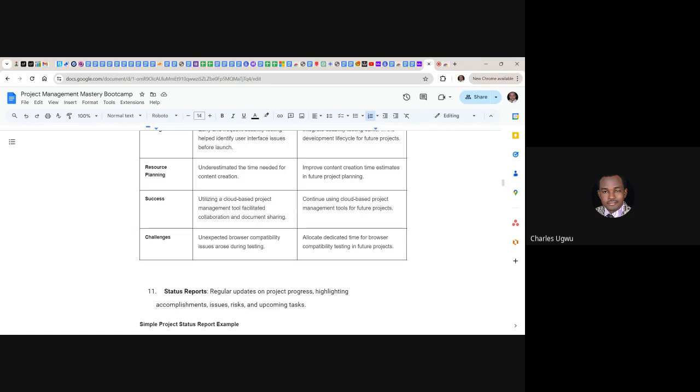So like I said, the best time to do a lesson learned meeting should be immediately after the RAID meeting. RAID meeting is when we capture risks and issues and have a mitigation plan to manage all those risks. So when all these are being managed, we should immediately document the lesson we learn when we manage every risk or every challenge or issue within the project.